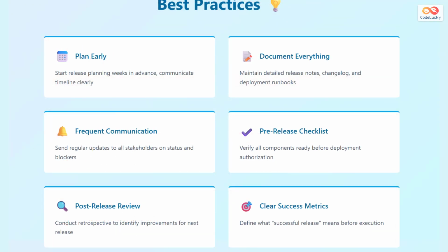Release managers should follow 6 best practices. Plan early by starting release planning weeks in advance and communicating timelines clearly to avoid surprises. Document everything, including detailed release notes, change logs, and deployment runbooks that others can follow.